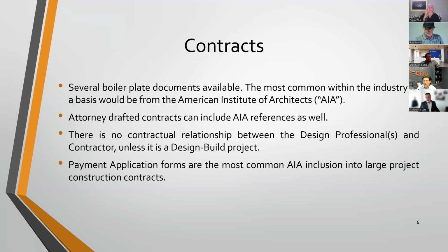But here are the important parts, the insurance. For me, that's a really critical issue: do you have the right insurance? And do you have bonds in place? What type of bonds do you have in place? Working with the owner's rep to make sure that the contractors that you're hiring have bondability, that they have the proper bonds, the insurance, and the manpower.